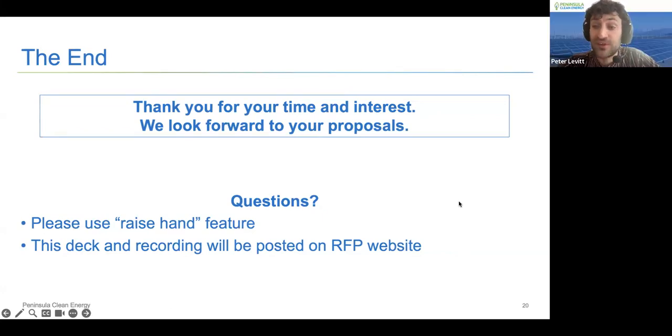Yes, thank you, Chris. So we did filter out a number of sites. We filtered out sites that our customers sent to us based off of a number of criteria. The buildings need to be owner occupied. The roofs need to be relatively recently redone or planned to be redone on the customer's dime within the next 6 to 12 months. So really no re-roofing work should be baked in. There might be some minor stuff like maybe some tree removal, some small stuff might be baked into the project scope. But overall, not a lot of substantial non-ITC eligible scope should be planned. Dave, any other comments on that?